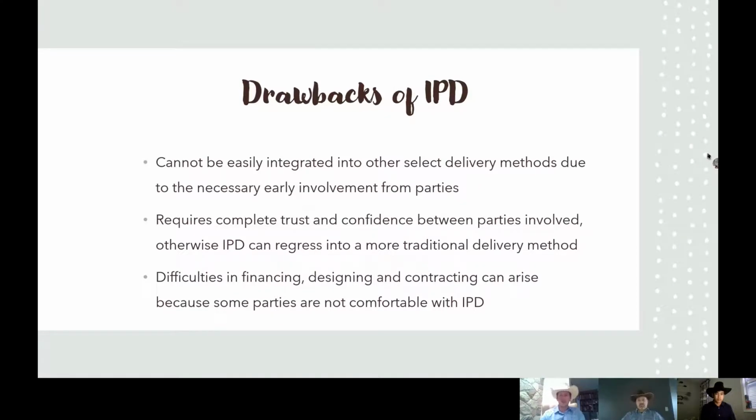Just to mention some drawbacks of IPD. It cannot be easily integrated into other select delivery methods due to the necessary early involvement from parties. So it could be integrated into some methods, but those methods are already likely not very used. When you're talking about a likely used delivery method such as design, bid, build, IPD really doesn't work. You can't merge them and try to do the best of both worlds because of that early start of IPD.